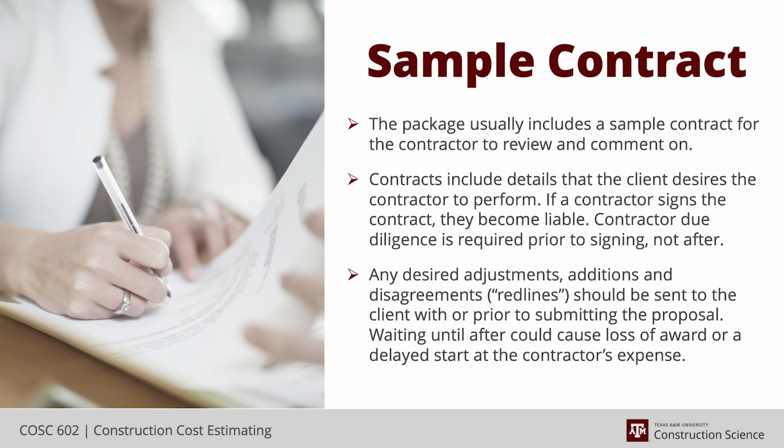So it became a substantial pressure on the schedule. I think it's important to note that the process of submitting the proposal, even though it's indirectly related to the estimate, has a direct impact on the estimate, and the estimate should reflect the outcome of this discussion. The project manager or proposal manager, whoever's leading this effort, needs to take the time to read through the contract, redline it, and submit it either prior to or with the proposal, one or the other, so that the client can start responding to your concerns in a timely manner.